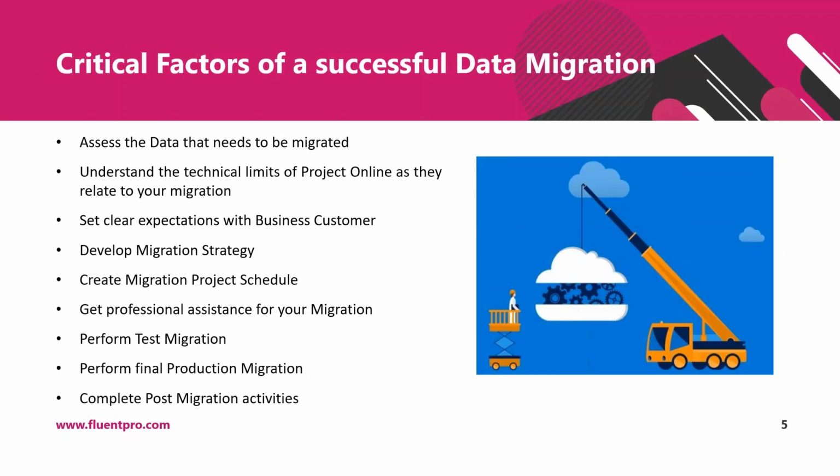There are several critical factors that contribute to a successful migration. First of them is assess the data that needs to be migrated. We will talk about what components of data should be assessed later in this webinar. Clear understanding of the amount of data and its components helps to build an accurate and detailed migration strategy and project schedule.